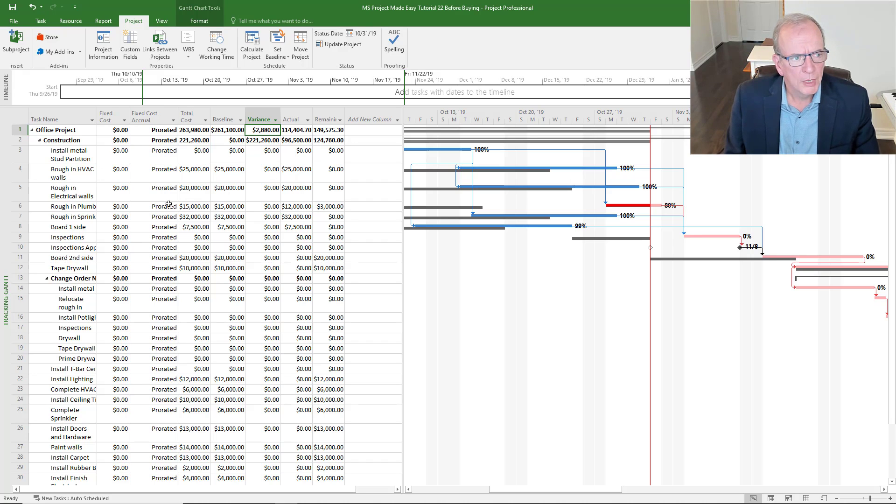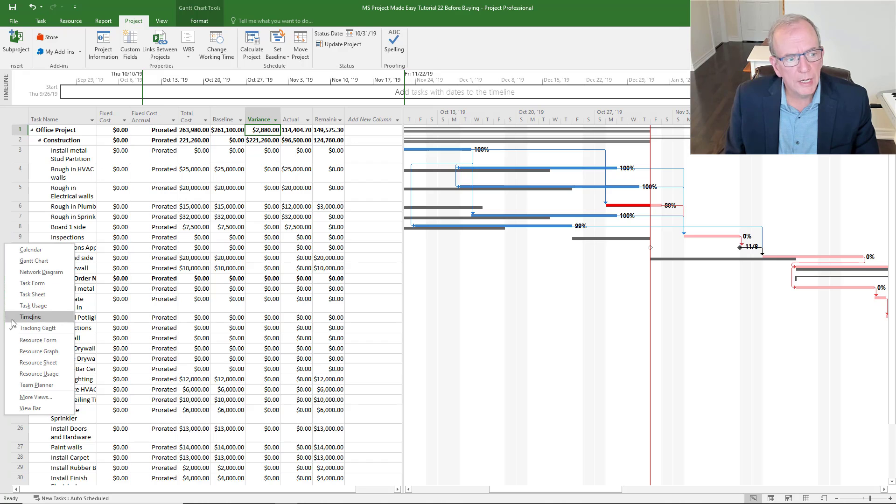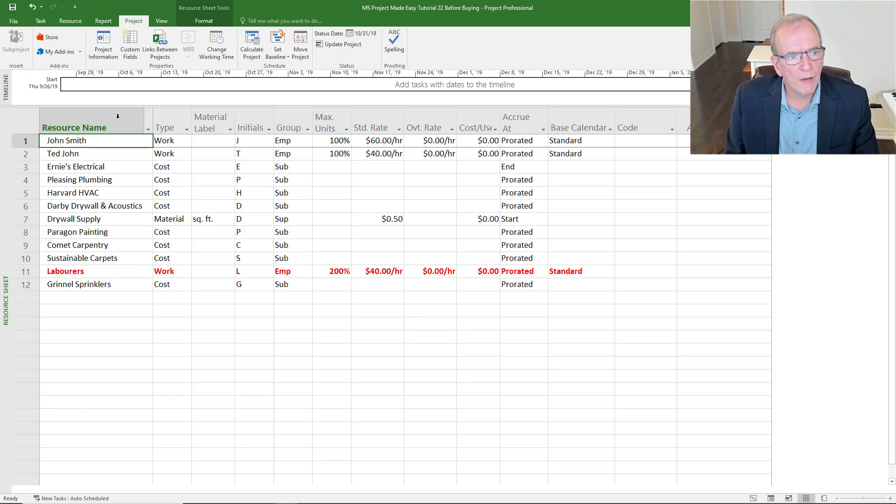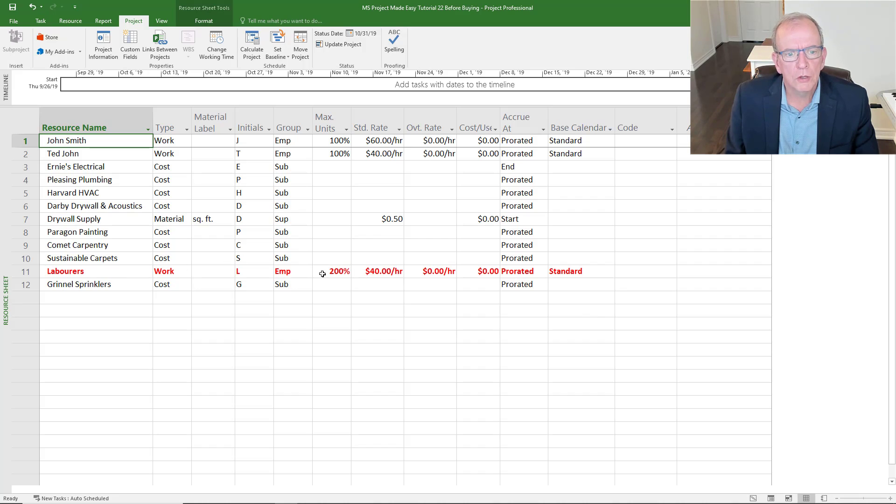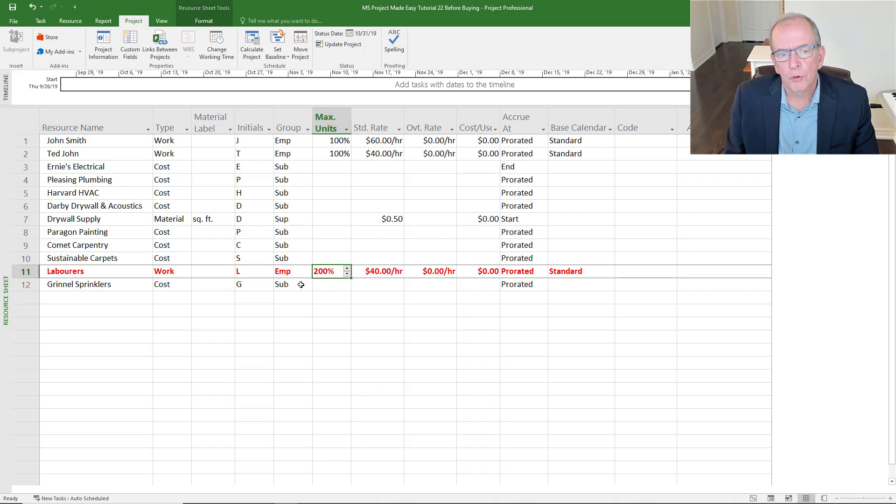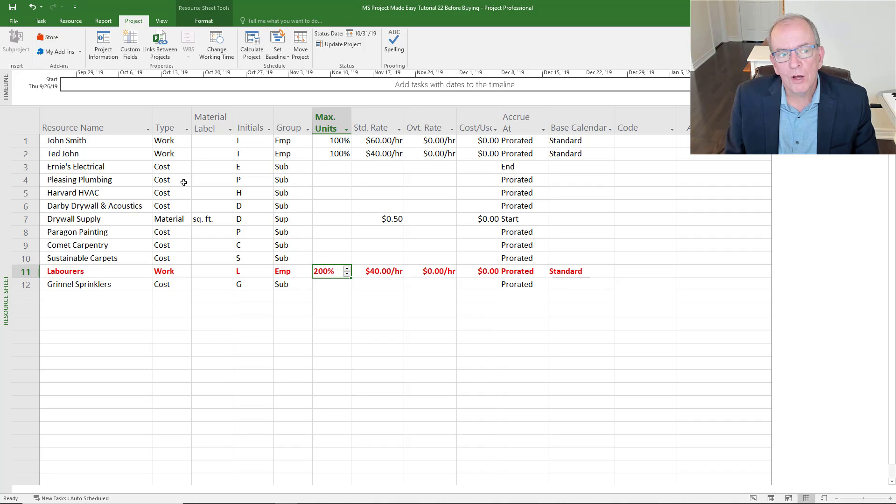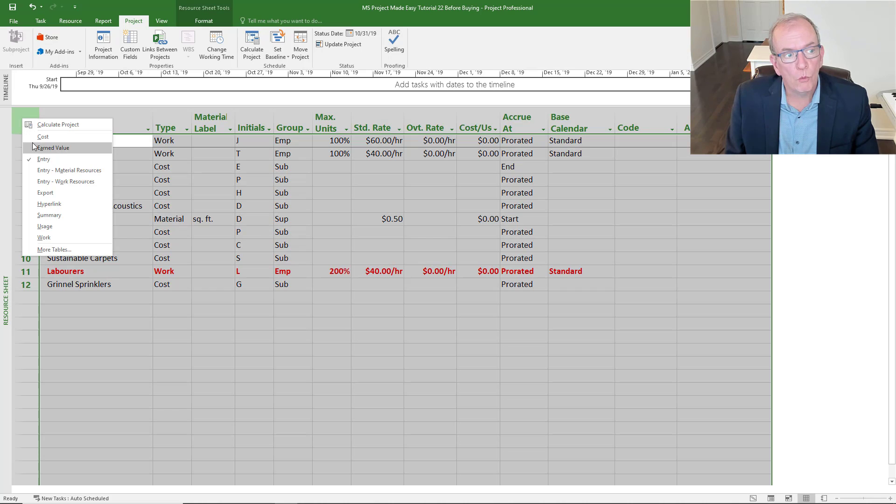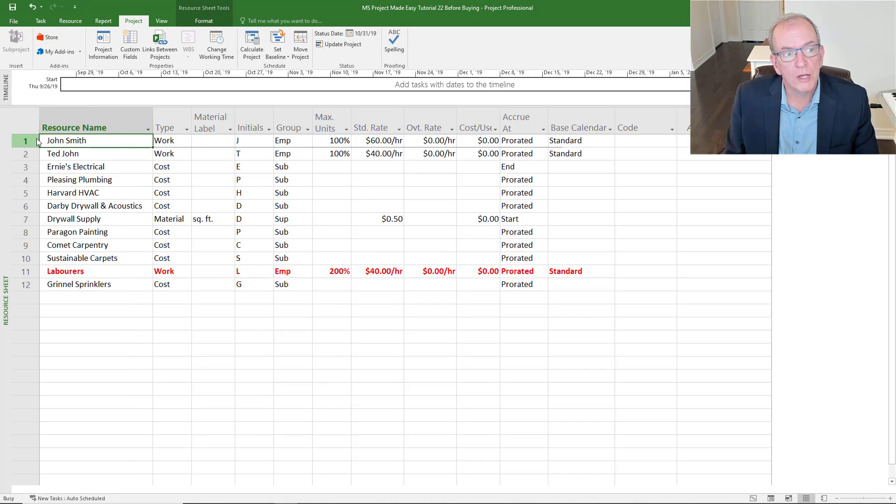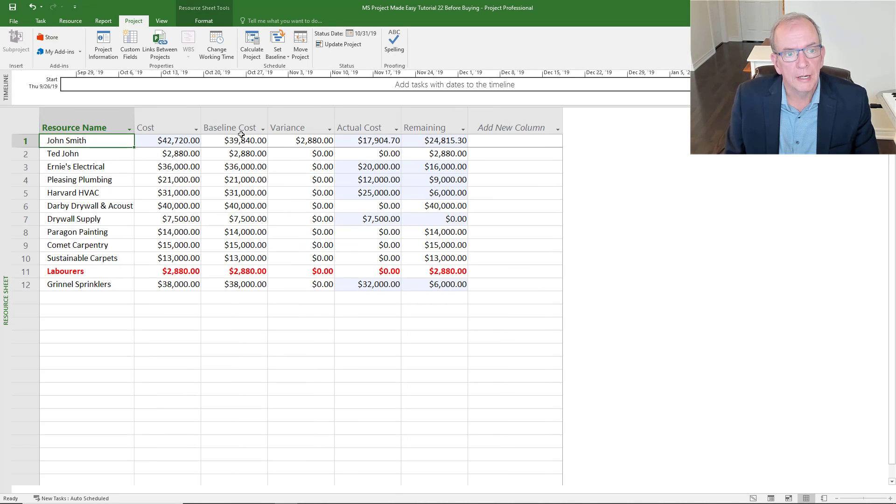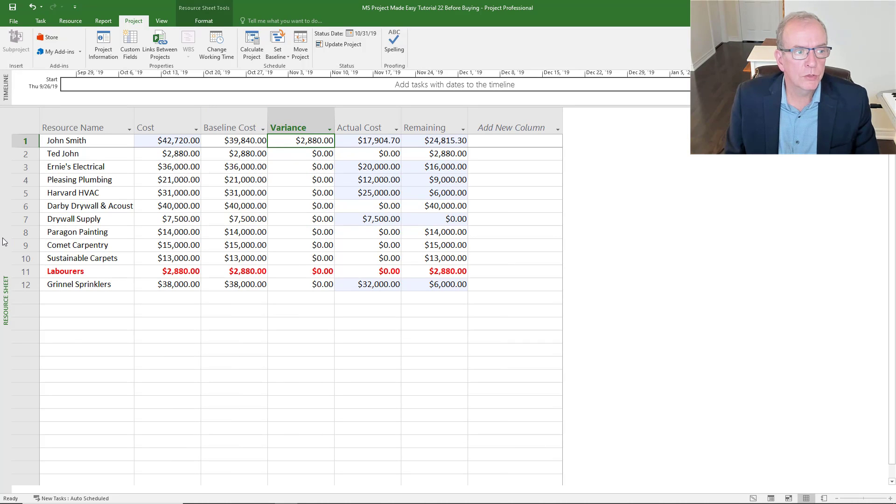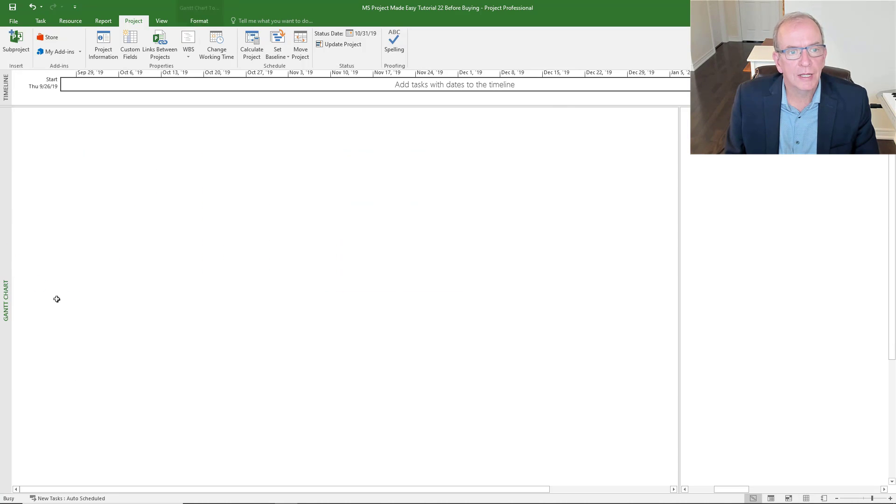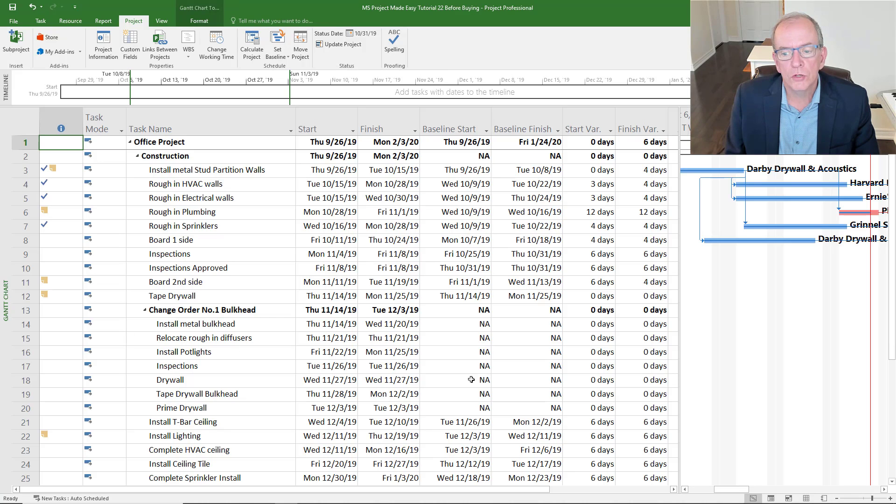But if you want to do resource and cost loading on the schedule - that's the terminology that's used - you can easily do that as well. To do resource and cost loading, you create a resource sheet and you have a bunch of resources that you apply. You can set parameters around how much of a particular resource you have, are they like a subcontractor, are they something you want to measure like linear feet, square feet, cubic meters. You can dive deep to see how the cost is performing and which resources are over budget.